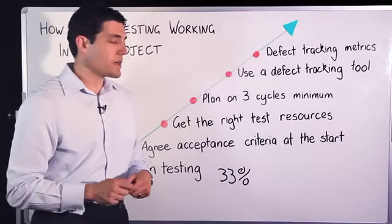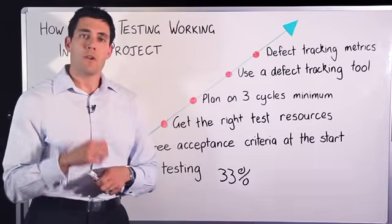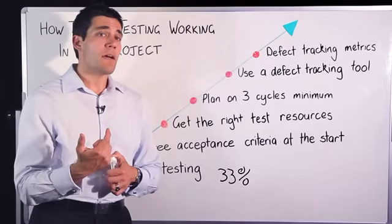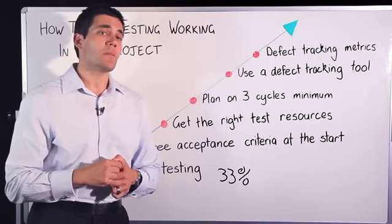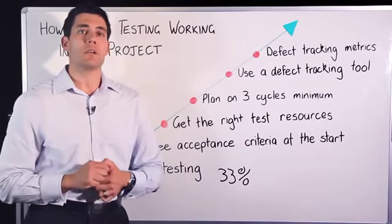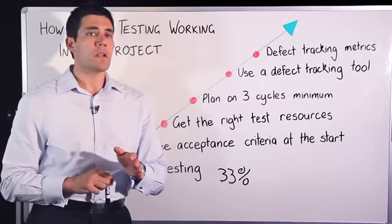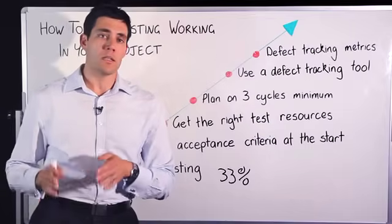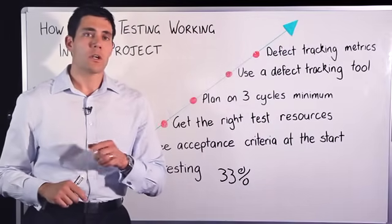You also want to agree your acceptance criteria at the start. If you've got a requirements document, maybe a design document handy, once you have those there, it's really the time to start coming up with your test scenarios and your acceptance criteria for deliverables. Certainly, you don't want to come up with those acceptance criteria whilst your project team is in the build phase of their project. You want to agree those up front.